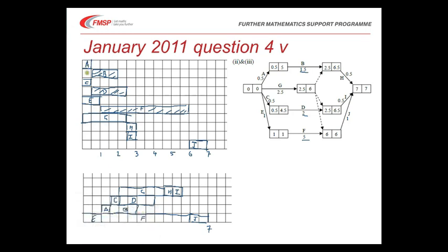look at this diagram here, for the first half a minute there's 4 people. For the next minute we're using 2 people. For this time here we're using 1 person. Then here we're using 2 people. Here we're using nobody. And here we're using 2 people.